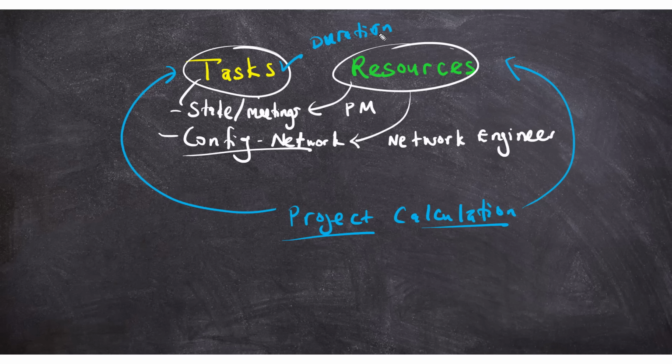So let us say, for example, that we've got a resource such as our project manager, and the project manager has to go about organizing and ensuring that everything that happens at the stakeholder meetings is successfully achieved. The stakeholders meetings duration is 2 days. All right, so we've got 2 days over here. So if our project manager charges us, let's say $80 per hour, okay, this simply means we've got to figure out how many hours in those 2 days is the project manager going to work.